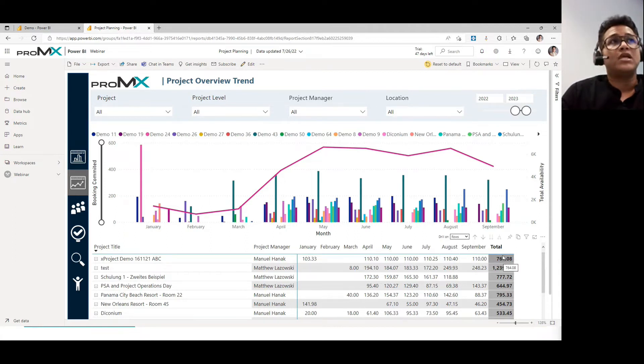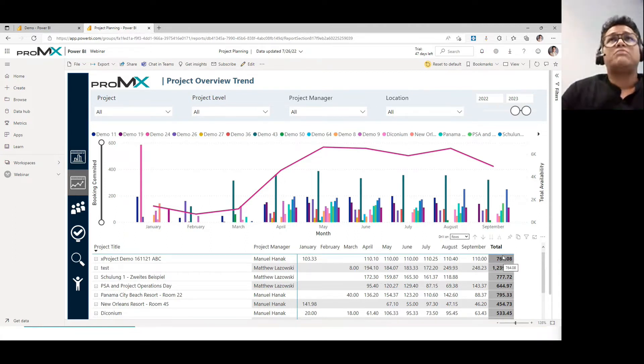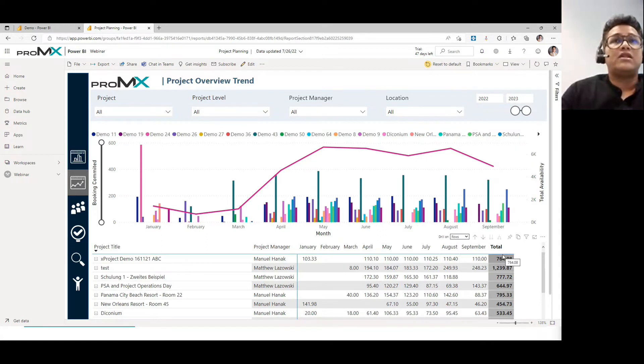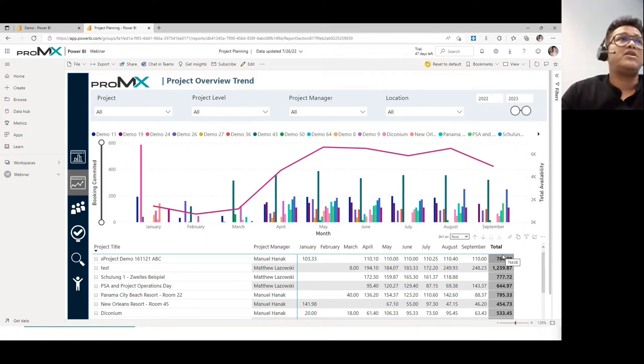So you understand totally on this particular project how many number of hours have been allocated till now. This also helps the project managers take care of the budgeting that they are not over allocating the team members and keeping themselves within the budget.